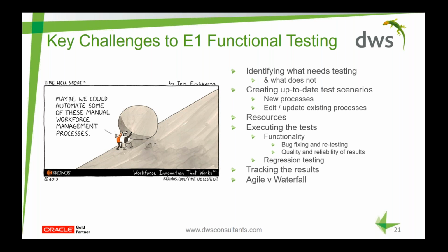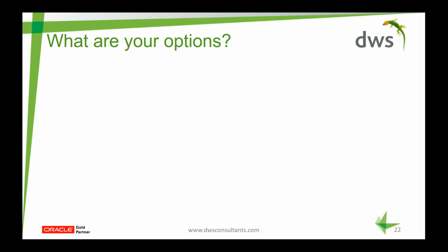With an agile approach, software is tested as it becomes available and in a usable form. So testing of one bundle of objects can be performed whilst development is carried out on the next bundle of objects. And you may recall we spoke about how you can create workable bundles of objects when we spoke about the execution of your upgrade in the second webinar in this series.